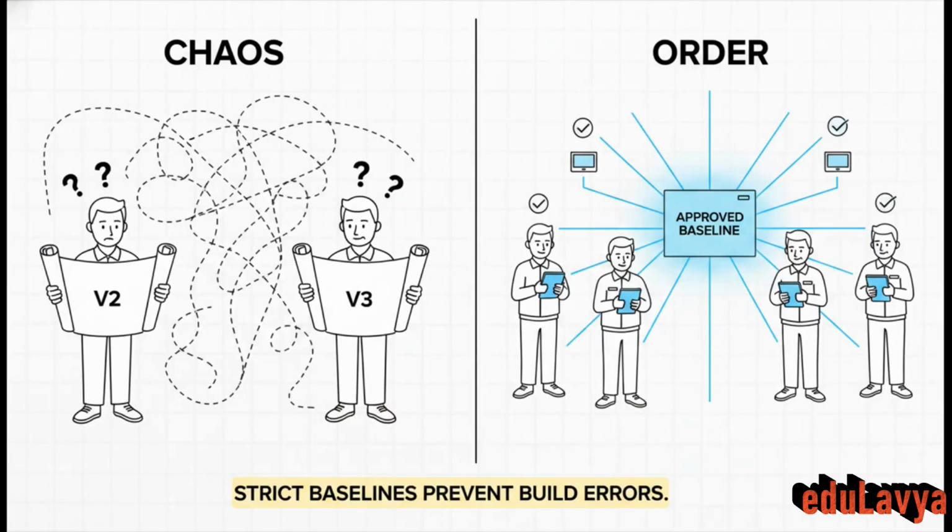So the real crucial point here is what we call configuration management. Installers must work from strictly version-controlled definitive design baselines. Imagine a huge construction site where the maintainers are working off version 2 of a drawing, but the testing guys are over there using version 3. It would be total chaos. The designer has to provide a definitive list of all applicable documentation so everyone on site is absolutely 100% certain they are installing and testing the correct, most up-to-date version of the system.